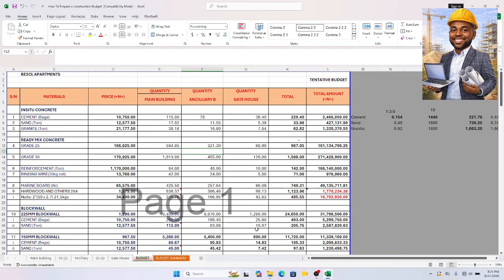The cost is your bill of quantity without markup. Now after you mark it up, it's called a priced bill of quantity or a selling bill of quantity, because that is what you're going to give out to the client while you hold your own cost. Right, so you're having two bills of quantity. You're giving one to the client, you retain your own part, both copies, the cost and then the selling. All right, now in preparation of your budget, you need your cost bill of quantity.